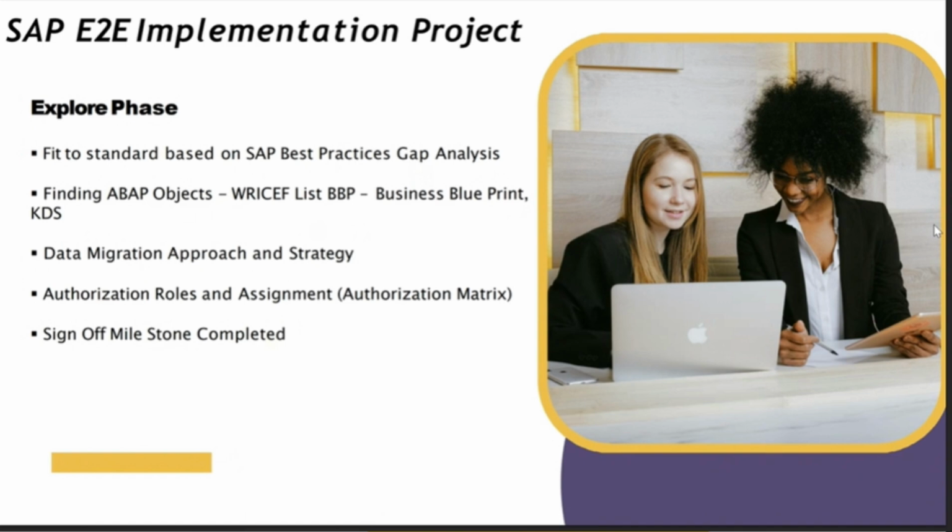and the customer will understand, out of 30 processes, how it is going to work in SAP. That's it. We have not done any configuration, any BPD or configuration testing, nothing. We are just going to give a theoretical presentation to the customer to make sure that he understood the process first. That is what we are going to do in the Fit to Standard workshop.